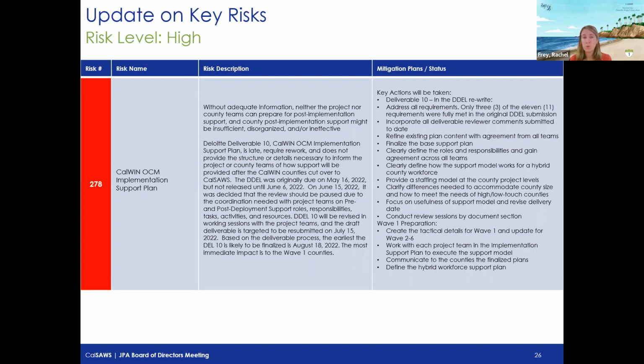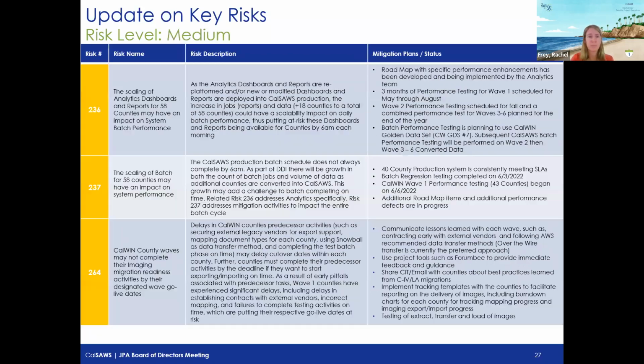We have 2 upcoming milestones that we are tracking towards relative to the implementation support. And those are associated with confirming resource allocation to support the post-implementation support period, as well as the pre-implementation support period, and then working through the details of some of the processes that will be followed as part of that effort. And those are coming up in August. So it's something that we're going to continue to monitor, but something that is trending right now towards amber. Okay, I believe, Arnold, that moves to now our medium related items.